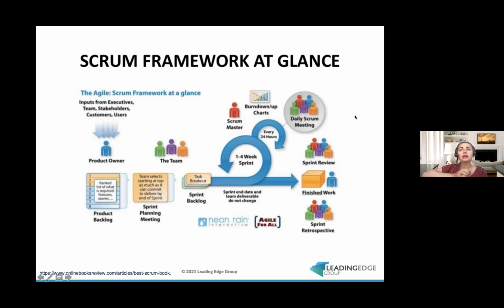We also have, and it is recommended, an additional meeting where you refine your backlog. All those requirements which are broken into smaller stories, the team needs to refine them. The team sits together and thinks about how they might approach the work, what needs to be done, whether there are any dependencies, and whether the dependencies need to be removed before we can take the work. They prepare the stories to be ready for the sprint, and this is called the definition of ready.